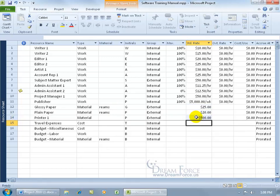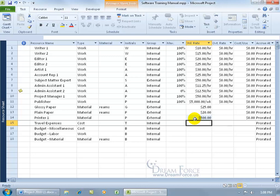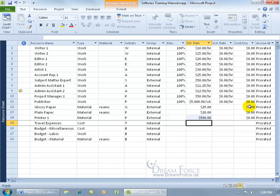Now you want to be careful, because if you assign the printer to more than one task, you're going to be adding, for each task you assign it to, $500. If you don't mean to do that, but you want to be able to share the printer and assign it to all the tasks, then probably the best thing to do is to assign the cost to one printer, and then add a bunch of other printers here but with no cost assigned to them. So you can say, hey, we're all sharing the same printer, but it's just a one-time cost for the printer here. In fact, that brings up a good point. We do have the cost per use field over here that we'll cover in a later training video, a one-time cost for the use of it.